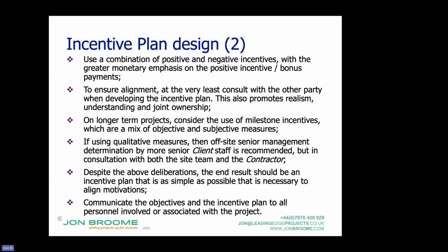In the ones with positive incentives, from the word go, the whole atmosphere of meetings was, how can we solve this problem? How can we overcome it? And that was reflected in the results of the project. Okay, as in the ones with positive incentives perform better, in time, cost, quality, etc.